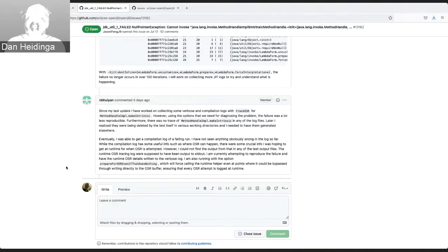Okay, so we're still looking, conservatively, at least a week until we're ready to release. Yes, I guess it depends on when the testing can begin, right? We'll do our own internal testing on it. That could take maybe a day. So if we got a fix in by, let's say, tomorrow morning, and did testing, that'll be Thursday morning. By the time that testing is complete, we might be in a position where we can start the final build for 29.1.